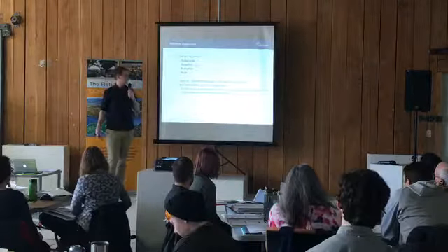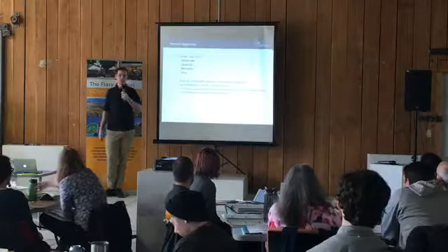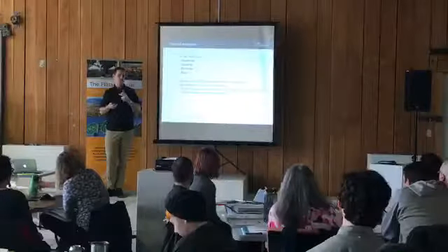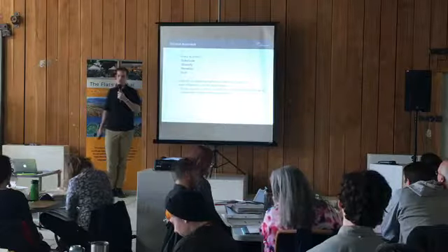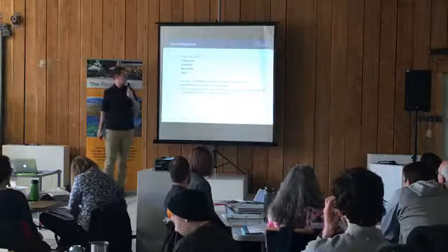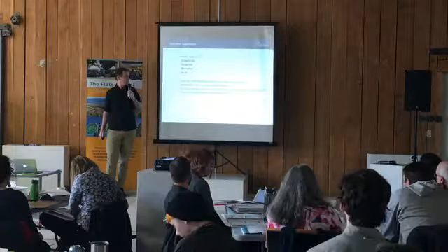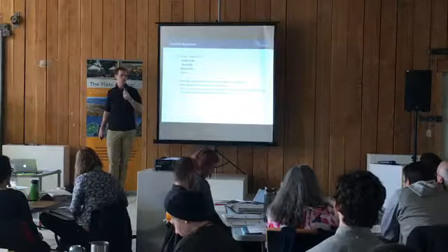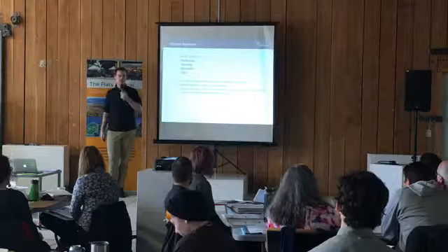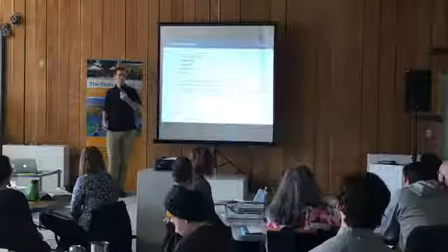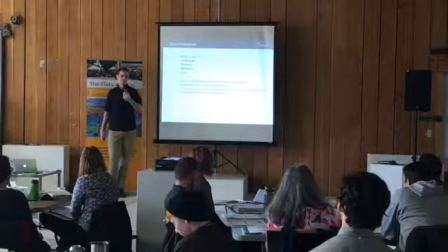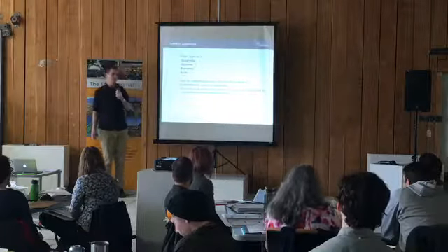We add up, and then we sum all those up, and then we add in some soft cost factors for things like project management and engineering costs, to translate our estimate from a construction cost estimate into an overall project cost estimate. One of the things we do also look at is comparisons with completed projects, just as a bit of a reasonableness check of the estimate. However, I'll just add as a caveat that that does require a lot of care, because sometimes reference projects are not actually as similar as they first appear to be.